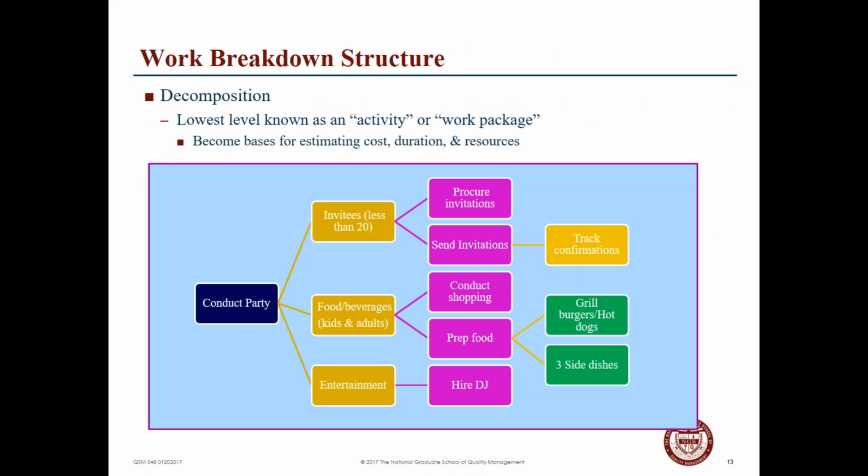So, decomposition. Let's look at an example here. What you want to do is get to the lowest level, which is known as an activity or a work package. And this helps to understand the way in which costs can be estimated, the duration of the project, or the steps that are involved, how long will it take, and what are those resources.